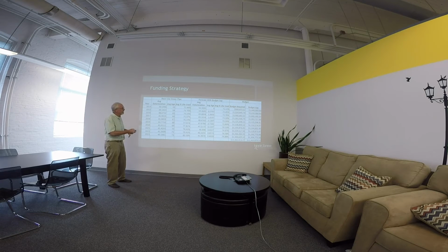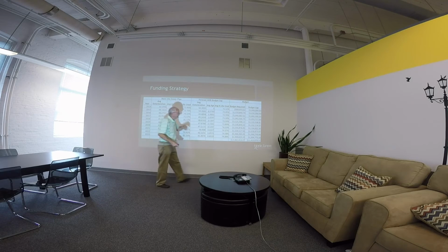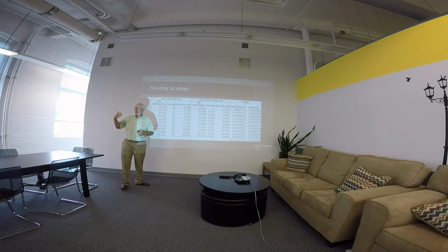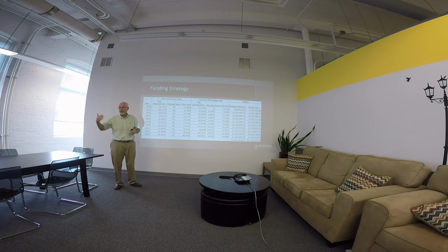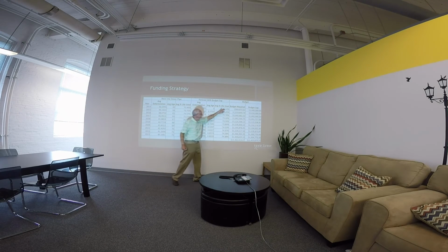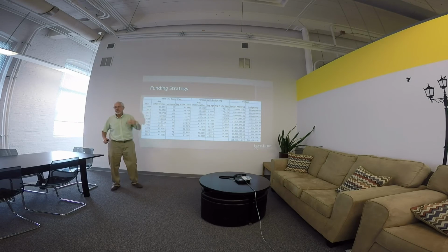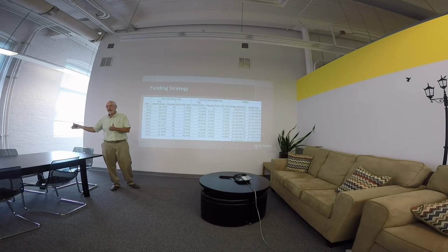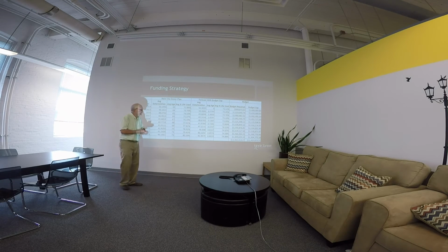Then this line is that you are given a budget cap of $1 million. With that $1 million, it is assumed that it will maintain a CIP increase of 3% each year. So that number keeps on increasing 3%. In here, this is the budget required. And sometimes you'll see that the numbers are a little bit below what the budget cap is. That means that the next project that's lined up is greater and would go over the budget cap, so it's not put into the budget system. So the software is calculating what projects, based on risk and condition and the probability of failure.